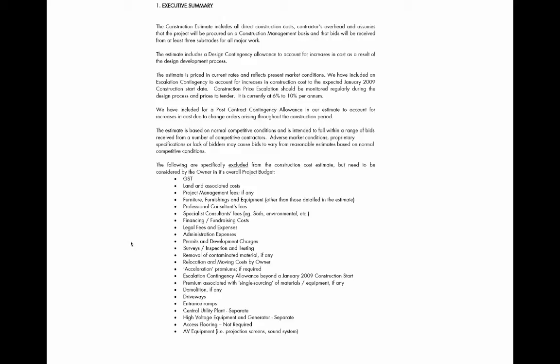So that's one of those things that seems to be always carried by the owner. But sometimes because it's tied to the square footage, how do you avoid losing that? Well, you can do a number for that too. For example, when we were looking at the Science and Tech Museum, we just worked out a number of what you would pay for storage systems at so many dollars per square foot. I think it's probably not too wrong. You can work it out based on square footage and having a number of what you might use for AV, and then you'll have a pretty good idea of what you would need to carry.